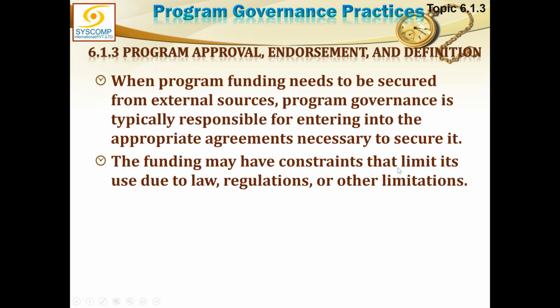Funding may have constraints that limit its use due to law, regulation, or other limitations. Naturally, you can see the loan we get from World Bank has its own laws and regulations. You can use this money for this purpose, and you cannot use it for that purpose. So funding from wheresoever it is coming, it may come with certain strings attached.